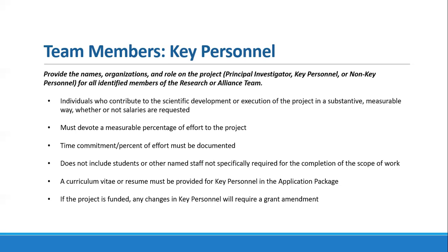For key personnel, we also require CVs or resumes be submitted, just as with the PIs. And importantly, on that last bullet point, if your project is funded, the key personnel are a category where any changes will require a full grant amendment. That is a relatively time-consuming process. So I would say it's important to get your list of key personnel correct, or as correct as possible, on the front end.